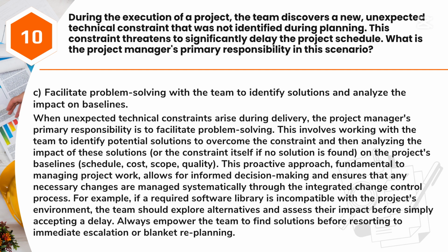For example, if a required software library is incompatible with the project's environment, the team should explore alternatives and assess their impact before simply accepting a delay. Always empower the team to find solutions before resorting to immediate escalation or blanket replanning.